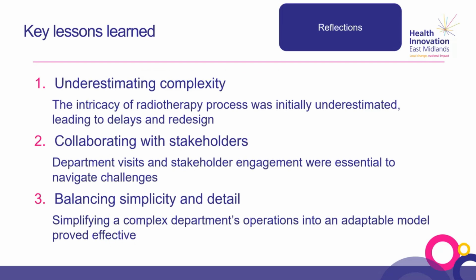So the key lessons learned. Underestimating complexity: the intricacy of the radiotherapy process was initially underestimated, leading to delays and redesigns. Collaborating with stakeholders: departmental visits and stakeholder engagement were essential to navigate those challenges. And then balancing simplicity and detail: simplifying a complex department's operations into an adaptable model proved effective. Thank you, and that's me.